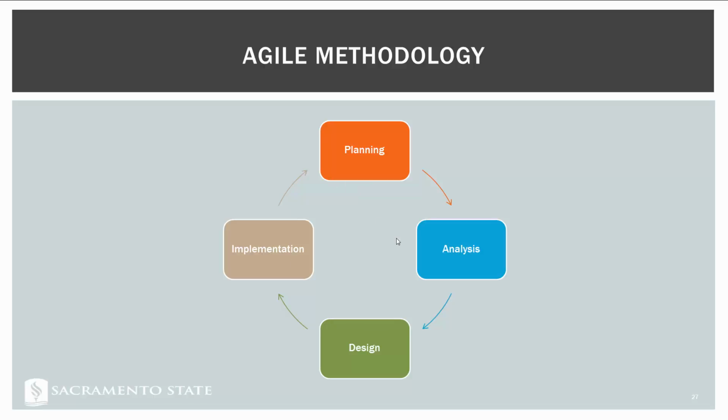Now, the disadvantages of Agile are, well, sometimes we can be stuck in this loop and not ever finish the project. Okay, that's problematic. It costs a lot of money to keep resources on a project. It also may not be as good for large projects, huge organizational projects. There's some indication that Agile is a little weak on that.